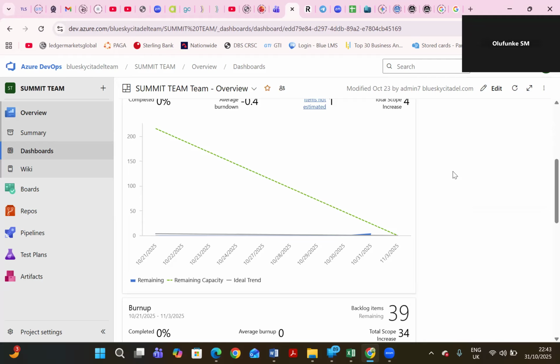Okay, and a quick question. Now we have about 24 stories that the BAs have already approved, despite the fact that we've only committed 4. So their focus will be on the 4 for now that are in the sprint. When we're going into sprint 2, the other stories that they want to move into sprint 2, they'll create tasks for after we've moved them to sprint 2.